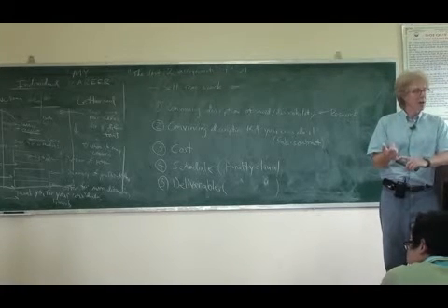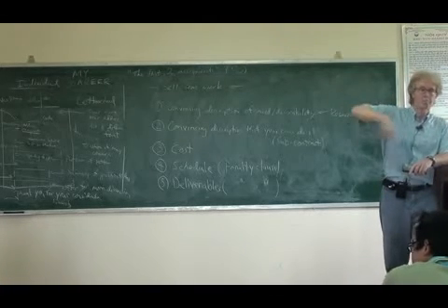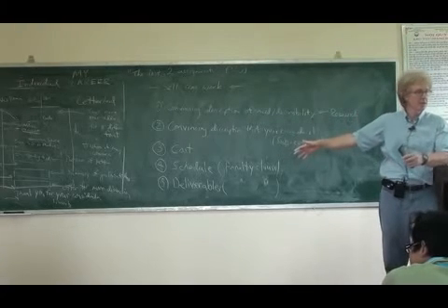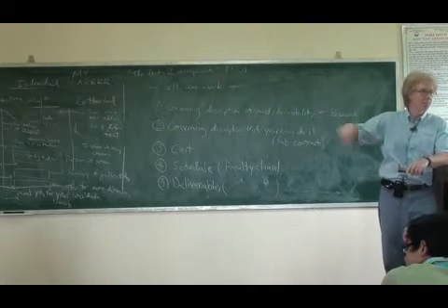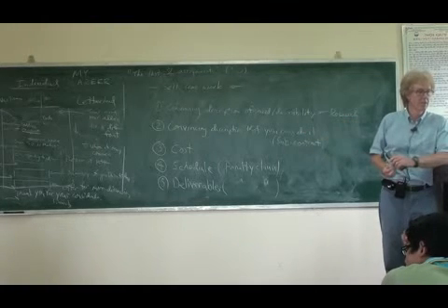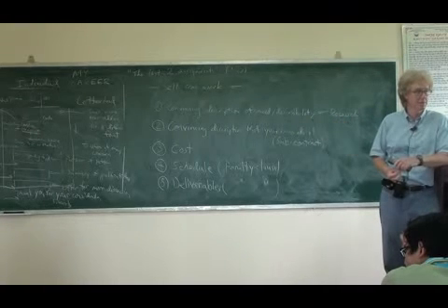The cost of having an office. If you rent a building downtown, you need to rent 5 rooms, so each person has an office. Maybe there's another room for a secretary, and you have to hire a secretary to manage the business of the company. All of that is part of your cost for 6 months. Right? So your proposal to me needs to have enough money to cover 6 months of existence.